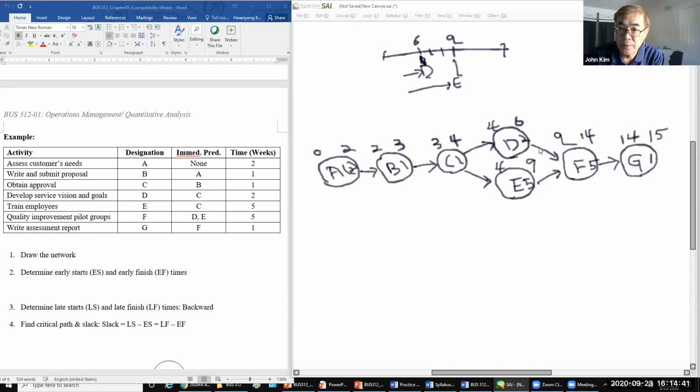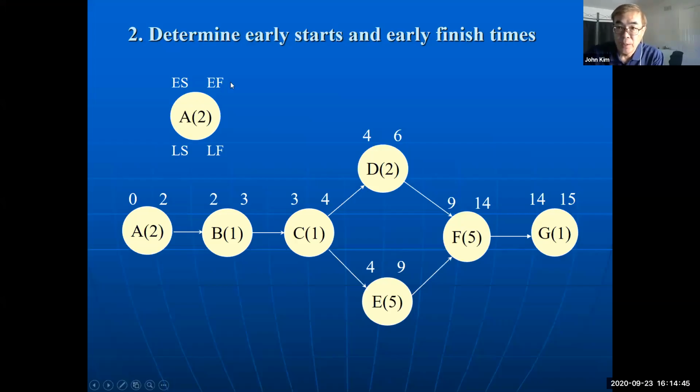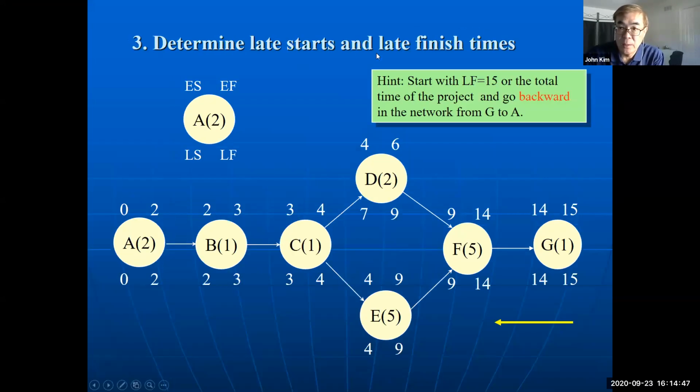And next step, determine late start and late finish times. Start with the last one, and then go backward.